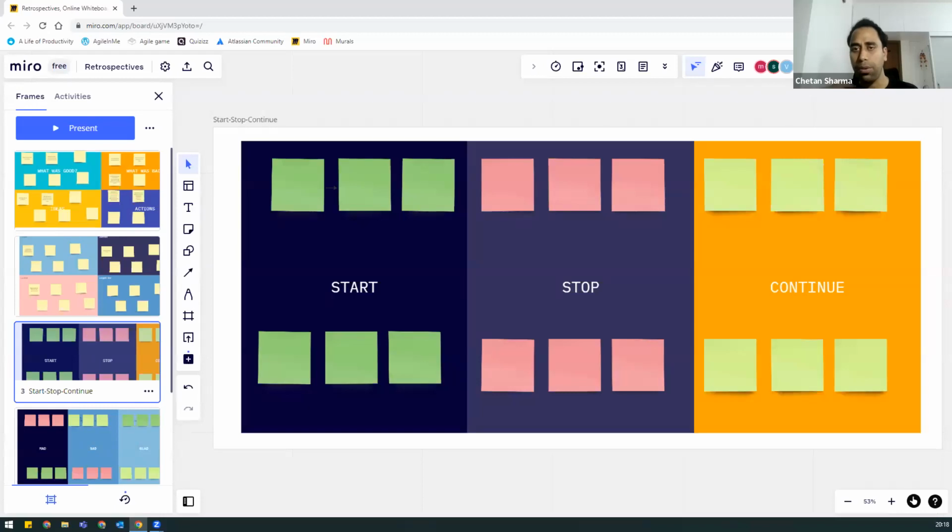Can we continue? Can we proceed with this? If your product owner has any feedback, they will say, okay, they want any other changes or not. It's easy for you. Now you don't have to follow the process of merging approvals and then deployment, then QA. Because if you're doing this process, and then again you get feedback after acceptance, you have to again follow the same process. So you are just saving the time. So these kinds of new initiatives, you can just bring it to the team, and then let the team decide where they want to put it, in the continue, the start, or the stop.